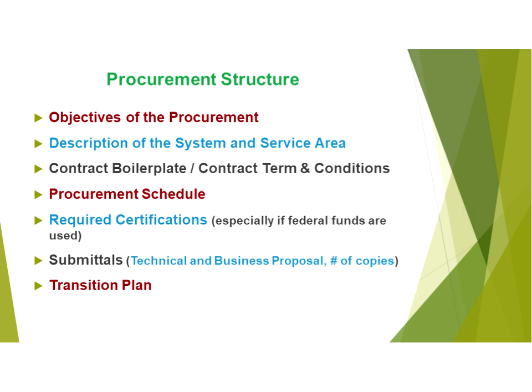Indemnification will vary according to your state law, whether you require them to indemnify you. Most states would prohibit, Virginia certainly does, a public agency from indemnifying anybody. Audit standards, dispute resolution, and termination for cause or by mutual decision. These are all factors that are very important.